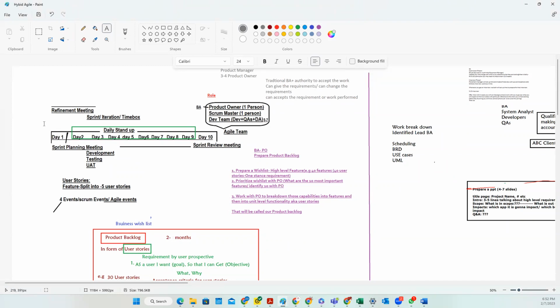The scrum master's job is to conduct all the events over the 10 days. On day one they do planning. In planning they discuss the backlog that is ready for work, and they pick up the features they can deliver in 10 days. The development team, who actually have to build, have the authority to pick up the work for their sprint.